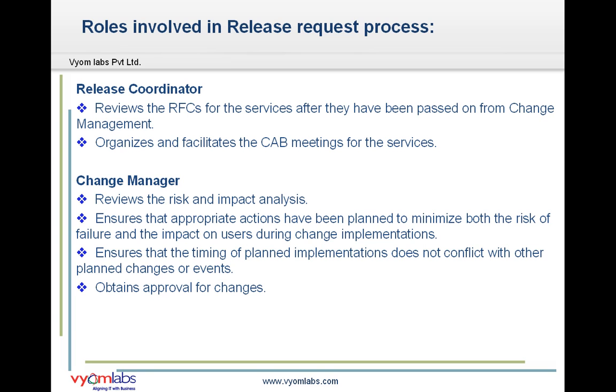He is actually splitting the requirements of releases into logical groups that can be handled efficiently by change managers. He also prepares a business case for a new release when additional funding is needed for its implementation. He initiates the implementation of releases and decides on corrective actions as needed. And finally, he organizes and conducts post-implementation meetings to collect improvement suggestions for future releases. So this is the work which the release coordinator performs during a release request.